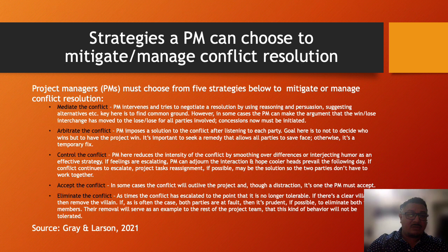Another strategy is to arbitrate the conflict. Here, the PM imposes a solution to the conflict after listening to each party. The goal here is not to decide who wins, but to have the project win. It's important to seek a remedy that allows all parties to save face. Otherwise, it's a band-aid fix, temporary fix.